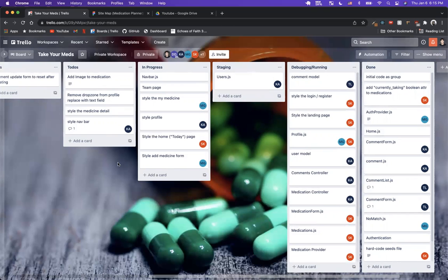And what this does is that instead of saying, hey, go build out an application for golf, right? That is such a huge task. You don't know where to start, what to do, or how to begin. What we are going to do is break that up into small manageable parts. And we are going to break those up into more small manageable parts and put those all in the to-dos. So instead of saying create a whole golf application website, I can just say create the authentication. That's a much more manageable thing for us to do rather than building out the whole thing.